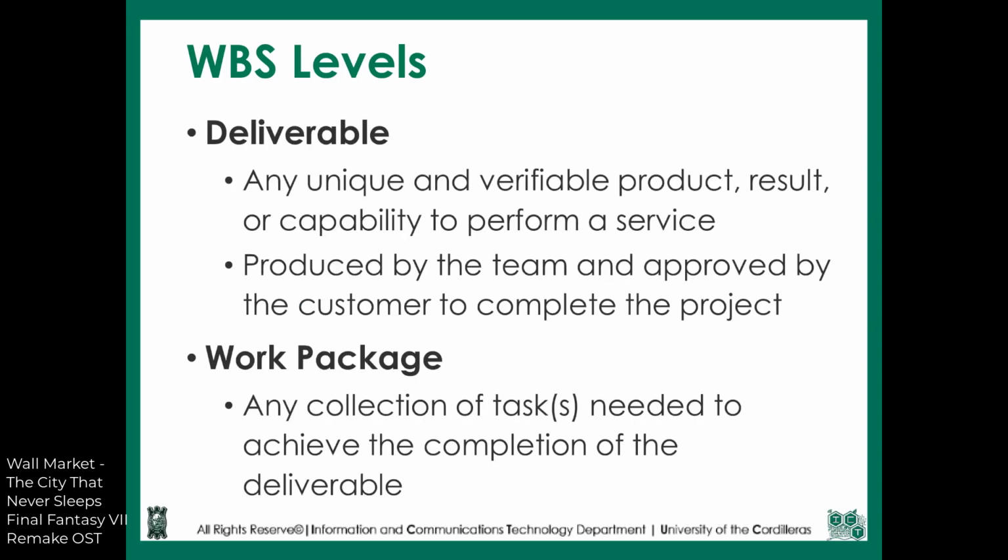A deliverable is any unique and verifiable product, result, or capability to perform a service. This is basically what the team must produce and what the customer must approve and receive at the end of the project, so to say that it is complete. A work package is any collection of tasks needed to achieve the completion of the deliverable. In a system, these may be known as the features. In an animation, this may be known as the stages of pre-production, production, and post-production.